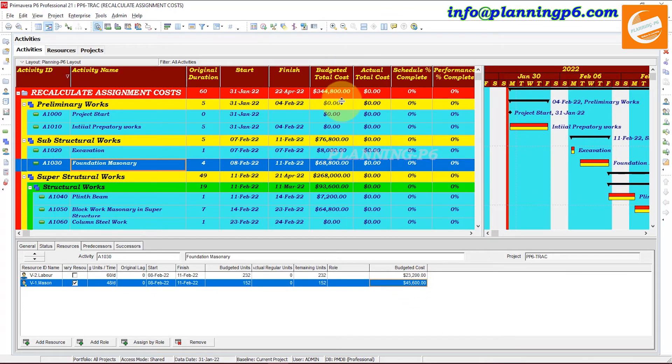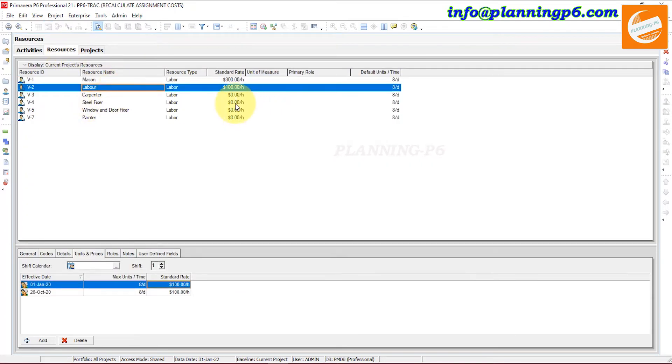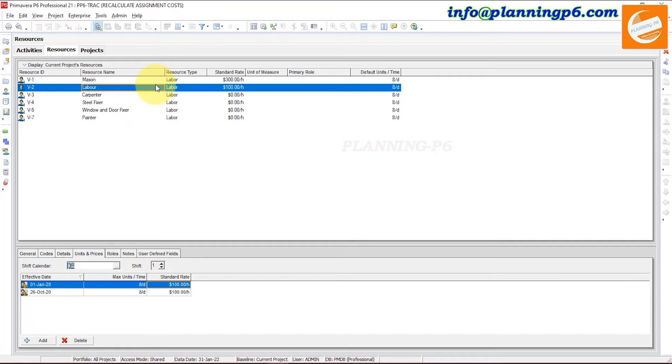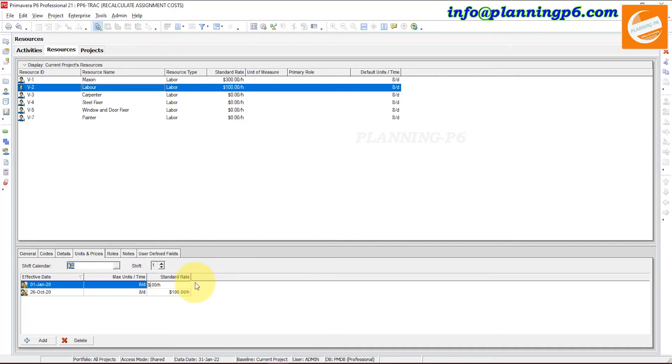If we go to the resources again and here change for the labor, suppose for the labor we want to change labor to 6 hours per day and cost is decreased from 100 to 80 dollars. OK.